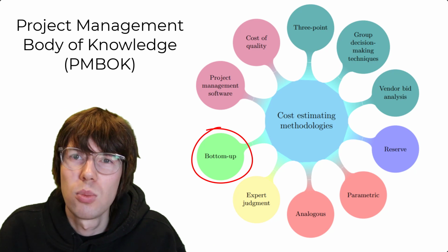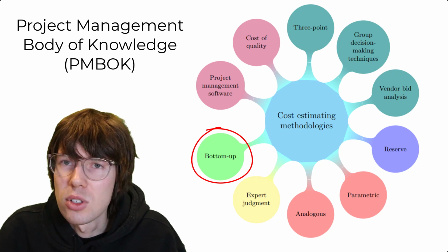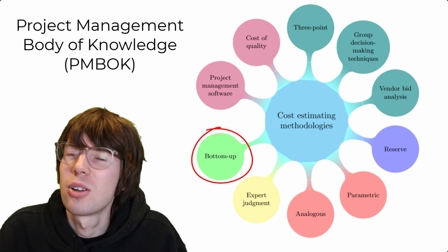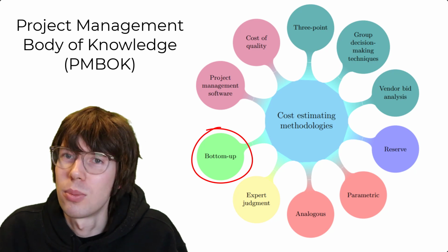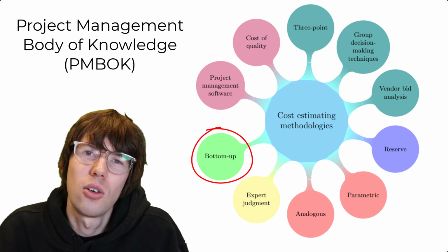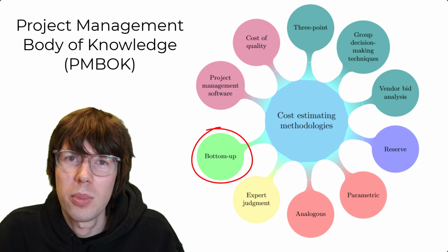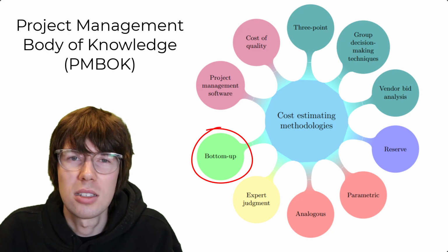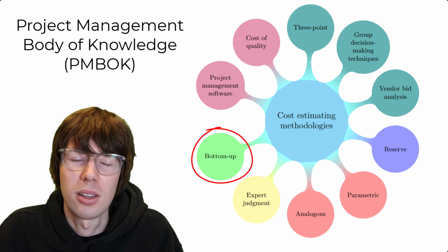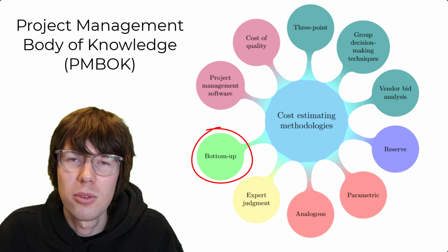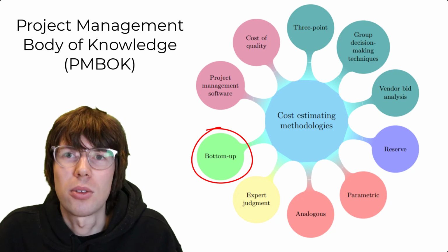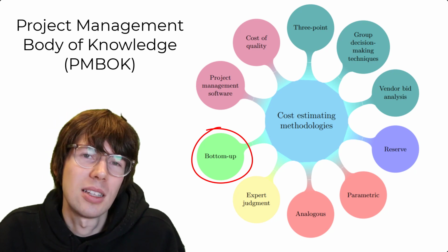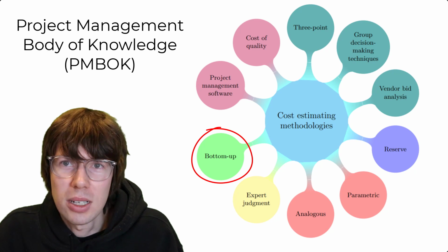And then you take those smaller components and disaggregate them into even smaller components, and then those smaller components into even smaller components. And you keep doing that until you reach a so-called work package. A work package can be defined as any unit of work that can be reasonably accomplished by one unit of manpower within a reasonable amount of time.